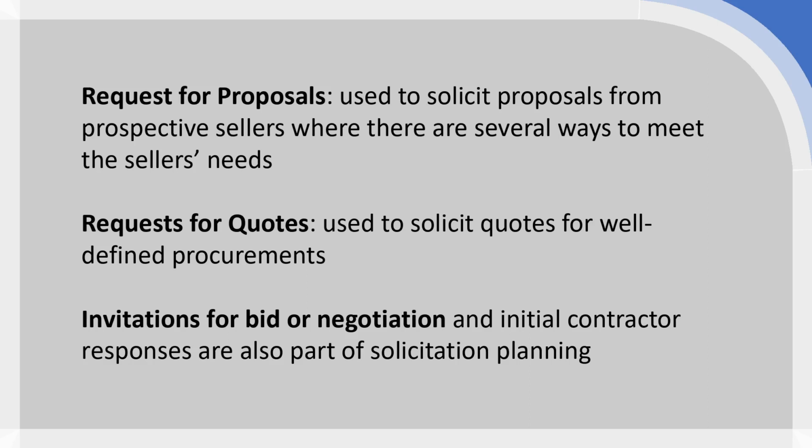quality standards. Lastly, if you have a large-scale complex procurement need, so if we're not just looking to procure a particular material or item, but actually we want to procure a much larger complex set of things. So this could be actually outsourcing an entire process to a supplier, or outsourcing a large body of complex work. Then you would want to start your solicitation planning and your procurement planning really by involving your suppliers as early